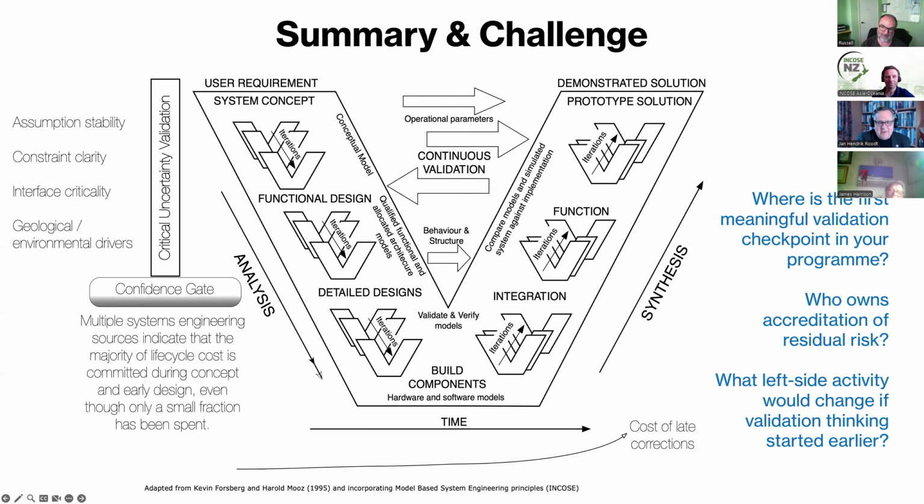So something like a V model is very applicable to that, because you want to manage those risks very early. Otherwise, it's a very costly exercise. Versus something more in the technology domain, where a spiral model might be more appropriate, because the end result's not fixed in concrete, if I can use that term, and you can come back and change things. A more iterative approach might be a better delivery model for that, because you can get early benefits. You can get something out there, like was just said. It might not be perfect, but you can come back and iterate on that and make it better. It gives you early benefit, but you know that you can manage the risks downstream, if that makes sense.